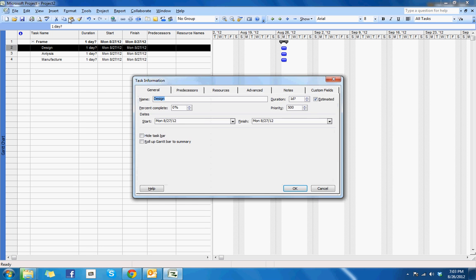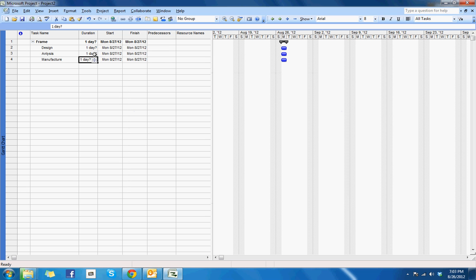And because I kind of want to be pretty detailed, we're going to probably stick mostly to hours, how long something might take in hours. So you can click duration and type in, say, 4H for hours. But if you wanted to, we could call it 4, so put in a D, or 4 weeks. And if you look on the right, the Gantt chart reflects that as well.